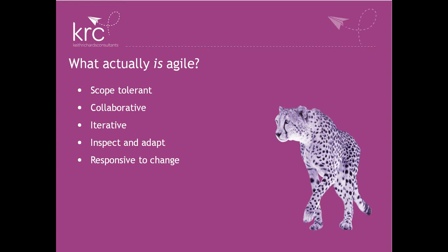What are you going to trade out? And this is how we work in terms of the Agile way of working. Importantly, don't confuse responding to change with what I call the goalposts moving. If the fundamentals of the project are changing, that's a different problem. That means we need to reevaluate and escalate the issue there. But if it's changed to the detail, then we need to be friendly and responsive to it.